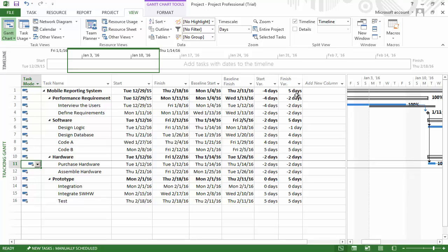In addition, like our example shows here, it is possible to have a positive schedule variance yet be behind schedule if your critical activities are the activities behind schedule. The schedule variance is useful in telling us how the schedule is doing in terms of cost. But when reporting on how well your project is doing in terms of time, you must view the variance table or your tracking Gantt chart.